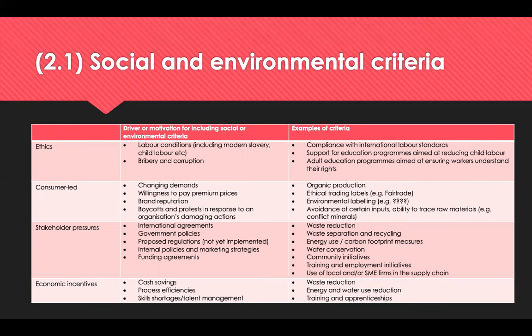The social and environmental criteria should tie into your organisation's overarching strategy in relation to social and environmental objectives. They need to be defined alongside individual specs, and should be written into the contract in the same way as any other requirement, using international standards where possible, and ensuring that they don't conflict with other aspects of the specification. You need to clearly indicate whether the requirement is a minimum standard, a mandatory level, or an aspiration to target. And have a cost associated with this. It might be larger for some suppliers than others, depending on the current practice.